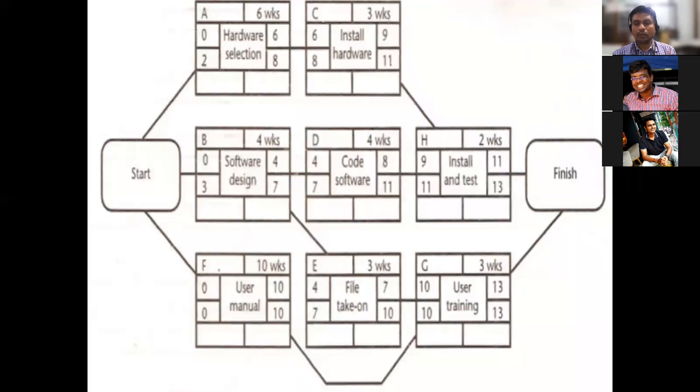So that is what provides them a clear picture about that particular activity as well as the path. Why do they say path? Because it's all dependent tasks. G is depending on F. If F is delayed, then automatically G is also going to be delayed. So that's the reason the path is also going to be a critical path.